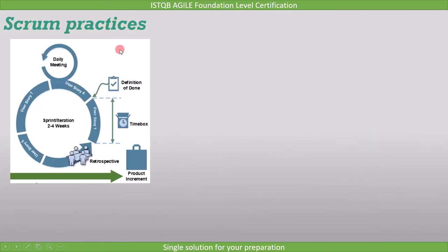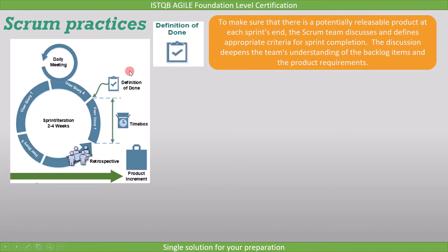Now let's move on to the Scrum Practices. The three Scrum Practices are Definition of Done, Time Boxing, and Transparency. Definition of Done is used to make sure that there is a potentially releasable product at each sprint's end. The scrum team discusses and defines appropriate criteria for sprint completion. This discussion deepens the team's understanding of the backlog items and the product requirements.